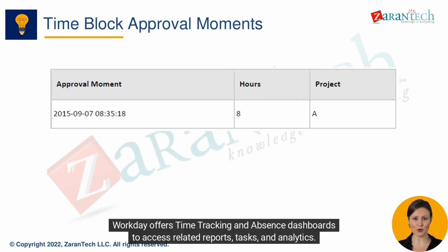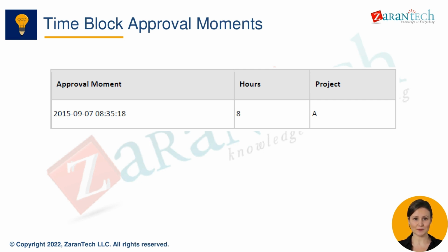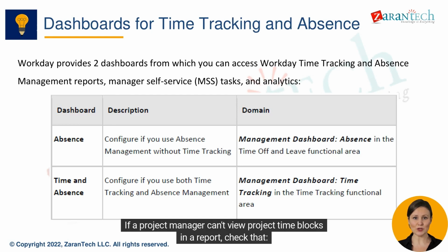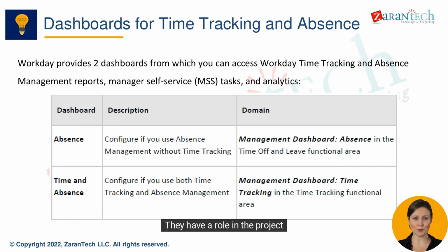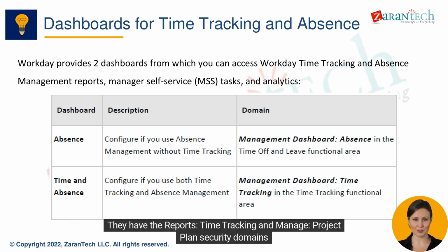Workday offers time tracking and absence dashboards to access related reports, tasks, and analytics. If a project manager can't view project time blocks in a report, check that they have a role in the project, the time isn't outside their supervisory organization, and they have the reports, time tracking and manage project plan security domains.